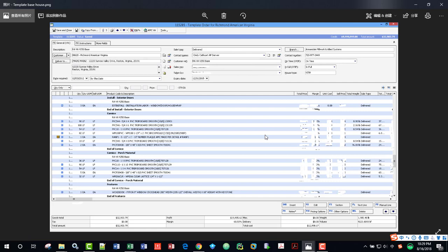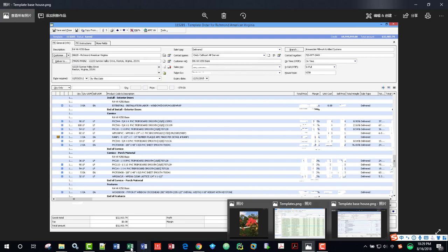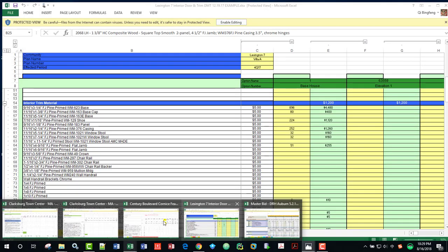The general working process in estimating is that the pricing estimator sets up the bid sheet. Every week we have between 5 to 15 new bids coming. Once the bid sheet has been set up, the takeoff estimator will do their takeoffs and then pass it back to the pricing estimator to price the job, check the takeoffs, review with the project manager, and then generate the bid proposal and send it out. Here's some of my work that I can show you.